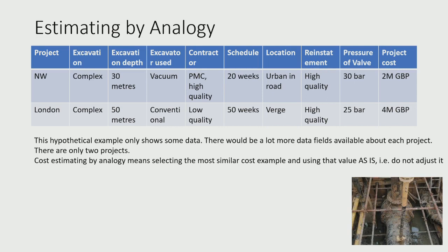If you take over the tracks to do some work because you've got a pipe going over the top of the tracks, or you've got something right next to the railway station which makes things unsafe when you're working, then you have to incur so-called possession time of Network Rail tracks, and that can be very expensive at King's Cross, where there's a kind of price system. People pay to use the tracks to move passengers and goods, and they have to pay Network Rail to use the tracks. So if you stop Network Rail making money, you have to pay that money to Network Rail.